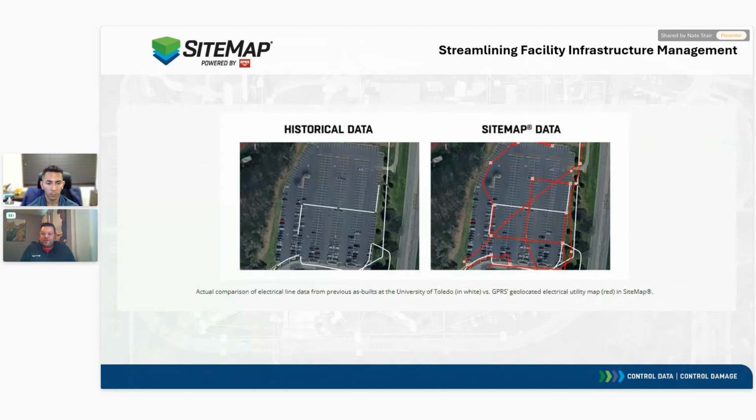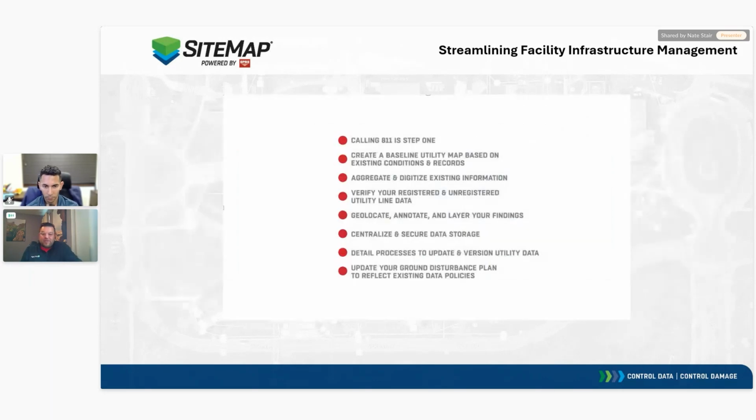It is law. You have to call 811 to get your public utilities all marked out. But we know that is just a small piece of the puzzle. It is required by law, but there are many utilities, as you can see here, out there. And that's really what Vicente has faced: there are existing plans and there's historical data, but a lot of utilities weren't updated over time. And that is a really important part of the process that we're trying to drive as far as safety initiatives.